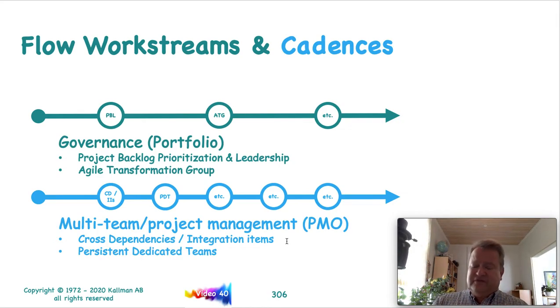I've been pushing for years to use big room planning. I used to call it the walkabout workshop, and would do half-day workshops with companies in order to help them understand how to smoke out the cross dependencies and integration items. And the big room planning will have about 100 people in that room or more, 12, 15, 18 teams that are going to come together.